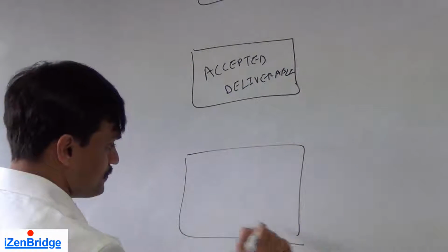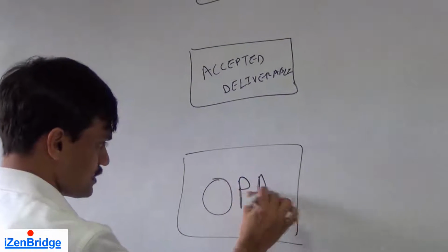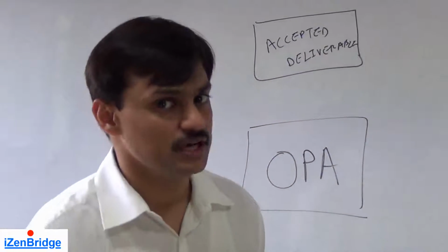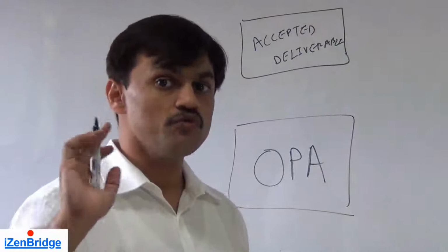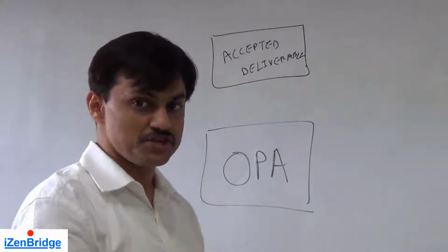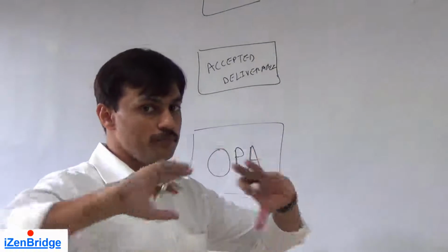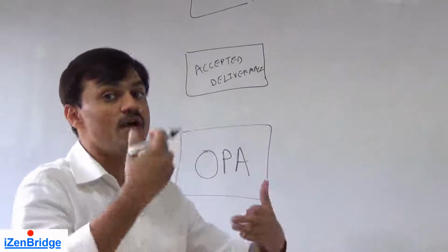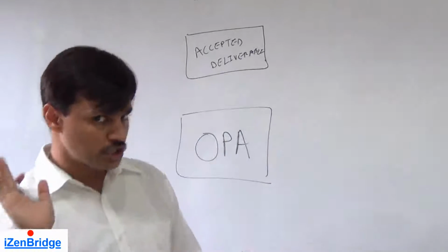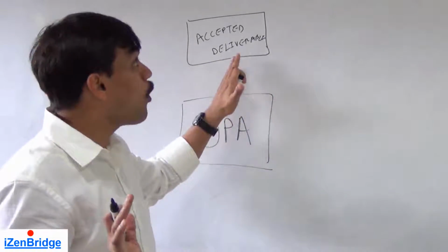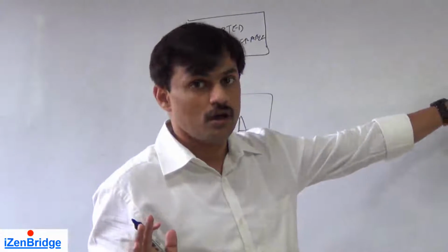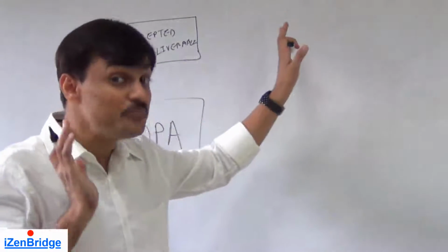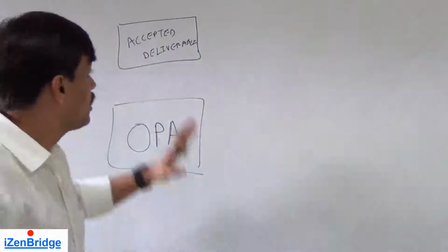and our favorite input, organization process assets. Now, where do these accepted deliverables come from? Validate scope. We have a process in project scope management in which we show our product to the end user or to the customer and get it validated along the project execution. You should not think that the product will get accepted only once you close the project. Once you close the project the product moves to production or transition, but you have been taking acceptance in parallel.